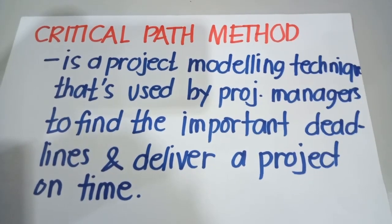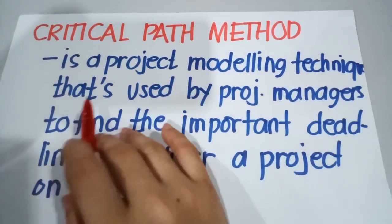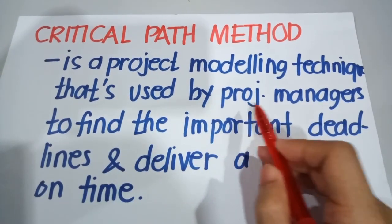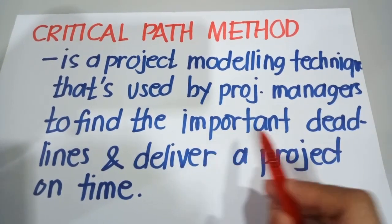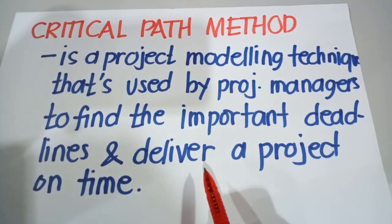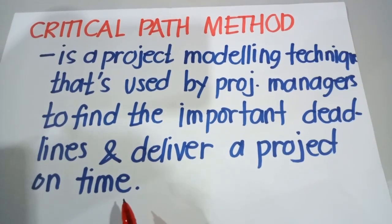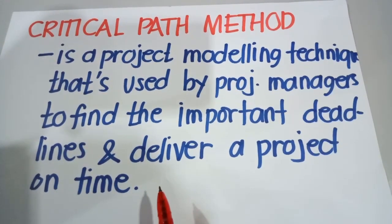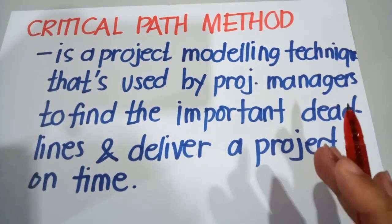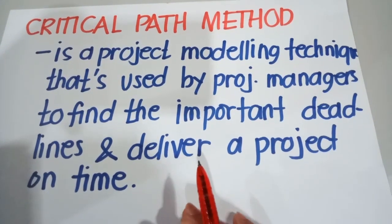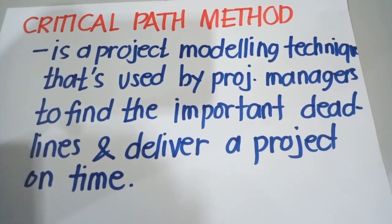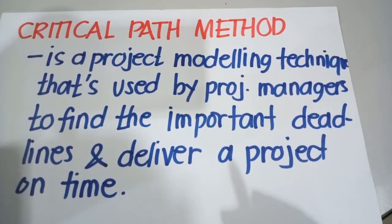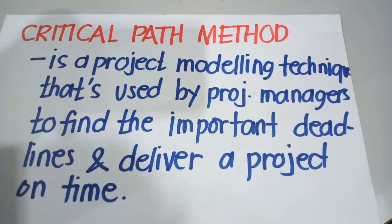So what do we mean by CPM? CPM is a project modeling technique that is used by project managers to find the important deadlines and deliver a project on time. Remember that in a project, the critical path is actually the longest distance between the start and the finish, including all the tasks and their duration. And once a critical path is determined, you'll have a clear picture of the project's actual schedule.